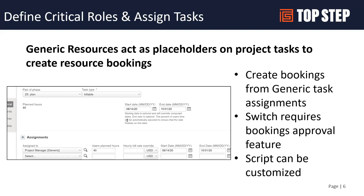It depends on a lot of dependencies: are you booking to a project or booking to a task? Is it just a create-only, or is there a sync back? Those are the business discussions we've had with customers on the best approach. It may also require some custom fields — for example, in my assignment I have a custom field for start and end date, because those exist at the task level, not the assignment level.